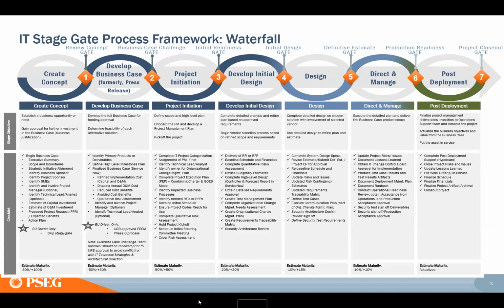come to this one. So cyber, as you can see, there's a cyber risk assessment, security architecture review, security architect, and these have templates which sit in the tools and templates directory. So when you get to project initiation, you pull that cyber risk, and in there it gives directions on how to submit that and how to engage cyber. Same for security architecture review. And that's where you get the sign off once you have a full design.